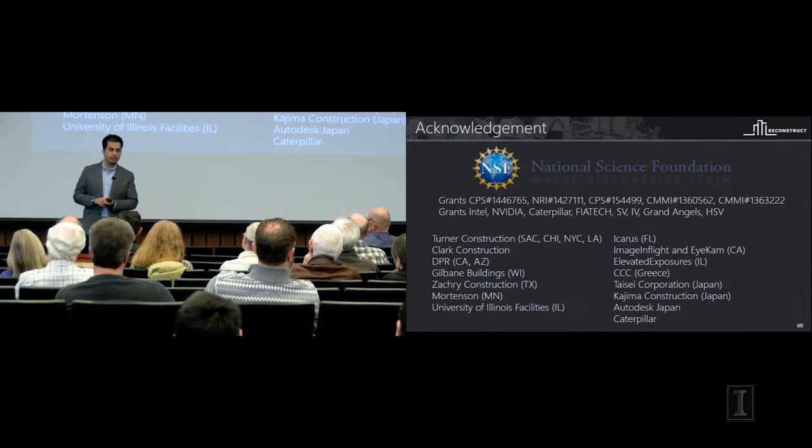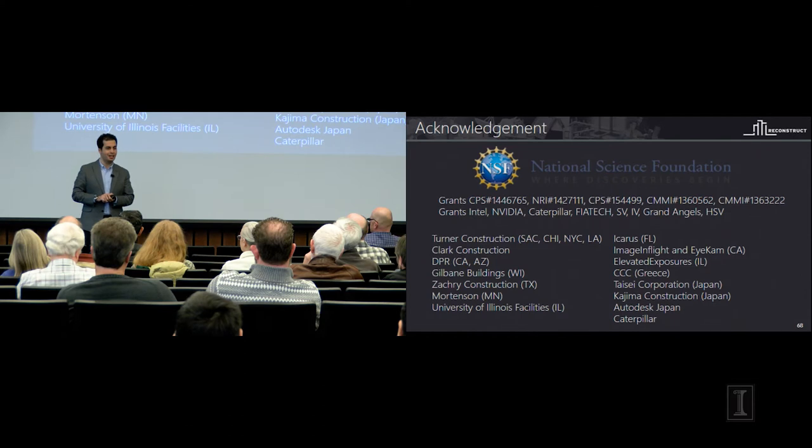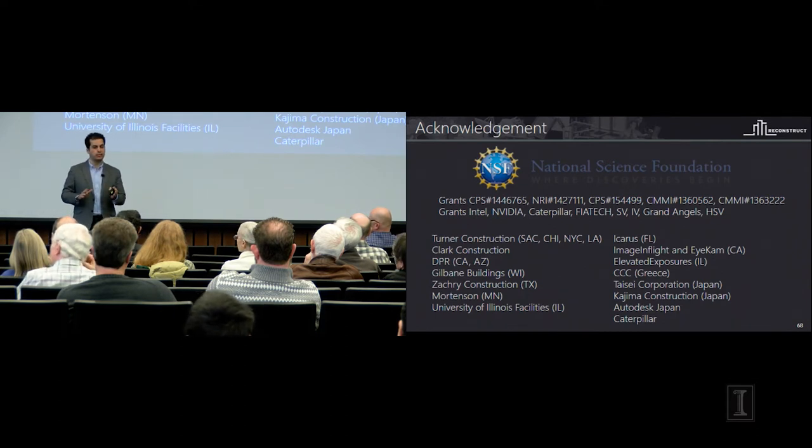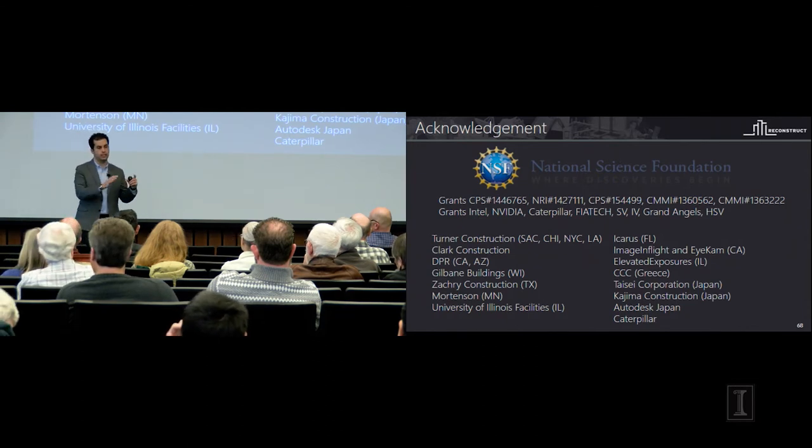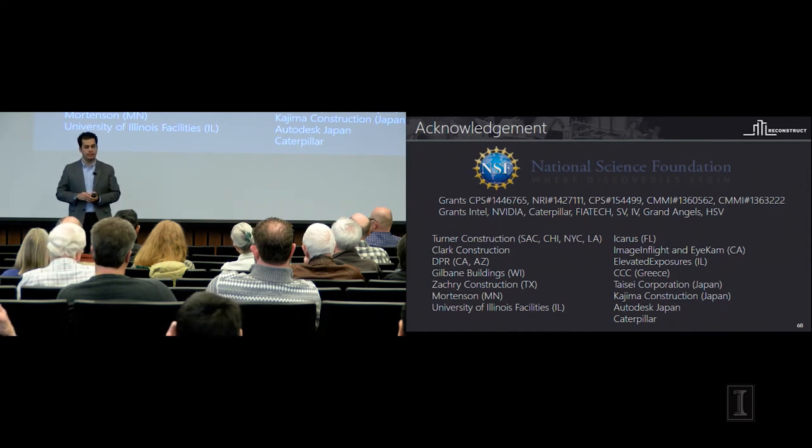But that does not immediately mean that you can cut the cost down by 25%. That means there are elements in your plan that you can more reliably establish when you're working on the job site. It's hard to see how much of the impact is purely because we're operating a drone versus the fact that we are now doing better planning because we have a workflow. So we are still working on separating these pieces and making sure we can assess return on investment in every single module that we're using, because there are so many things combined in the system that we have. I think there was a second part to your question that I...